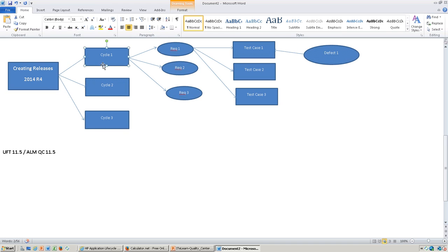So we will do the critical ones first, then the medium or less critical ones, followed by UAT or any other things that you want to do. We will do it in phases, cycle by cycle, so that you have a clear demarcation between your releases and cycles. A cycle we can call a good unit of work. It's a collection of units of work put under a particular umbrella known as a cycle, so that you finish off one cycle, and a few requirements are closed during that process.